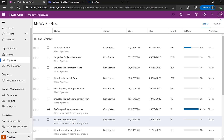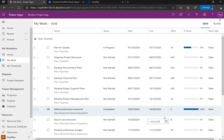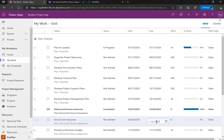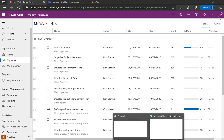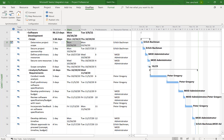There's another task to secure core resources due the 29th, but it's going to be a little late, so we'll move it to the fifth — now it will be completed on the fifth. As a project manager, I'll get notified of these updates. I can come back into my Microsoft Project schedule and click on Updates.